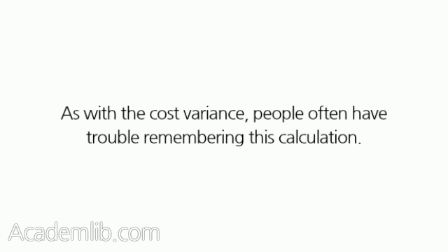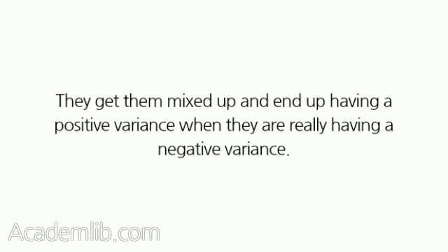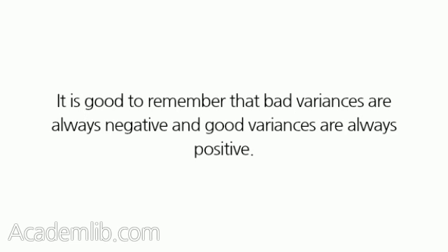As with the cost variance, people often have trouble remembering this calculation. They get them mixed up and end up having a positive variance when they are really having a negative variance. It is good to remember that bad variances are always negative and good variances are always positive.